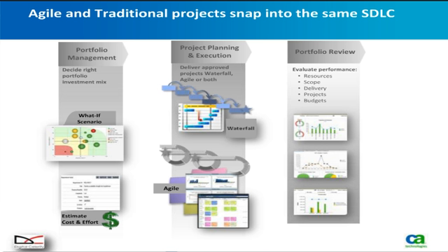You do your resource planning and capacity versus demand to figure out how you're going to distribute your resources across your projects. So that high-level planning goes in, and then projects get funded. You go into your stage gate or phased funding project life cycles, and projects get funded within Clarity, then they get staffed, and then they are set on their way through the stage gate life cycle.